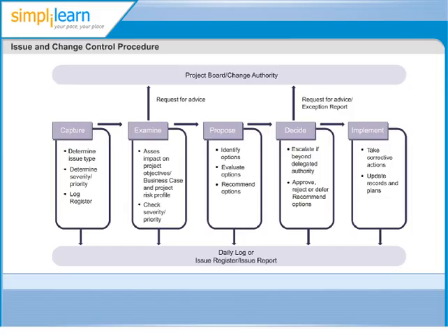Impact analysis must cover the three areas of business, user, and supplier. For example, the supplier's cost and effort required to implement a change and what products would have to be changed. Having undertaken the impact analysis, the severity or priority should be re-evaluated. It may be necessary to request advice from the project board to check their understanding of the issue's priority or